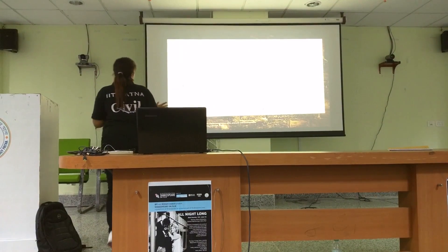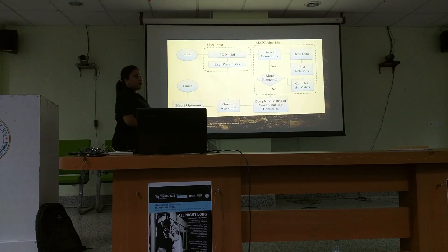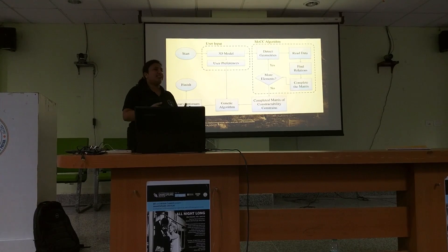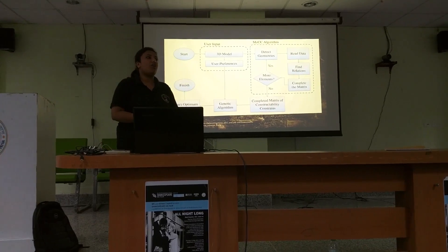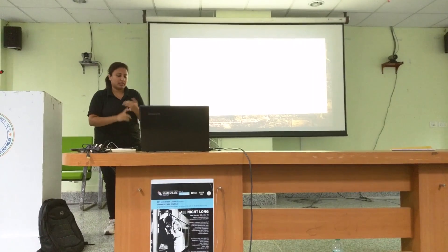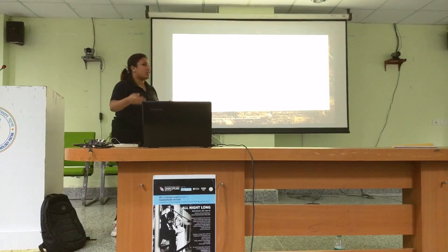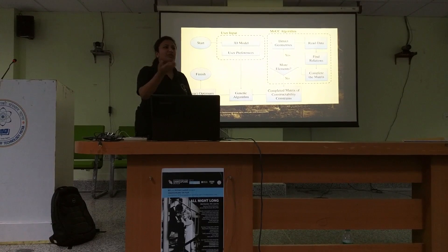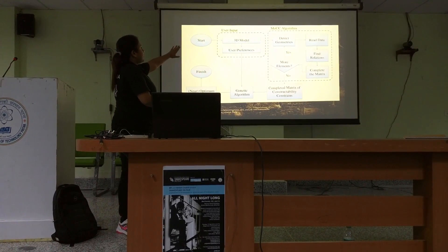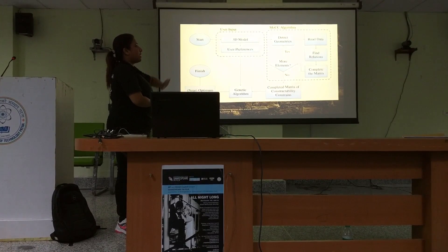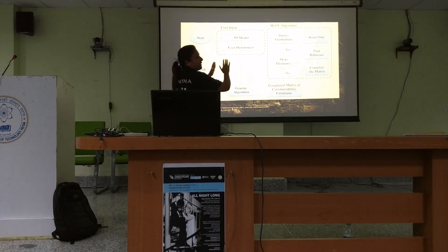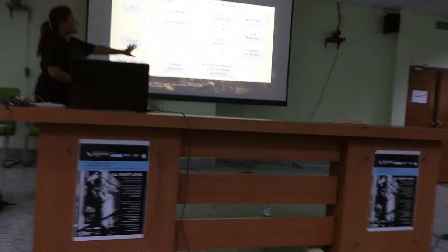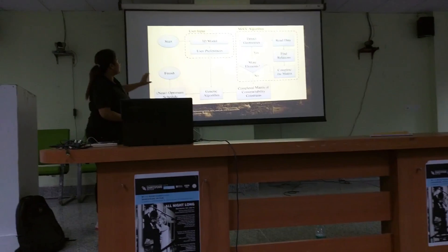First, let me tell you the algorithm we will be using for optimization of a project plan. We will give a user input. There is software known as BIM — Building Information Modeling — which is nothing but an encyclopedia of a building. It consists of 3D details of every element from columns to foundations, and also a schedule, which is the time table we use in day-to-day life. That gives us a 3D model as our user input from the BIM. Then we have the MOCC algorithm. After that we have a completed matrix of possibility — that is MOCC — which we put into the genetic algorithm, it optimizes, and we get a final output.